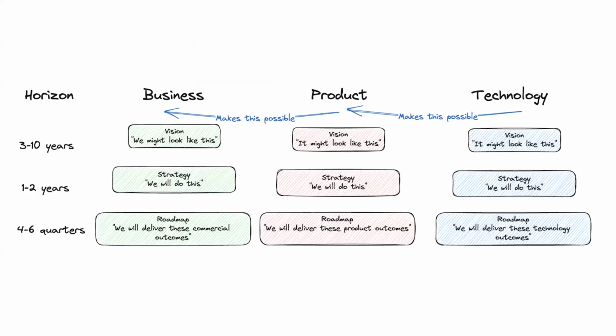Important to establish for roadmaps is multiple planning horizons. If you've just got one roadmap, it makes things a little bit awkward, because you'll find that stakeholders and people participating in planning processes start to treat the shorter term roadmap in the same way that they treat the longer term roadmap. And that's where we get some of those date problems that I was talking about before. It feels like committing to delivering a little thing that's short term, coming up in 6 weeks, is the same as making a commitment to something that should really only be a target, very mushy and flexible with a lot of risk around it, that's 12 months out.